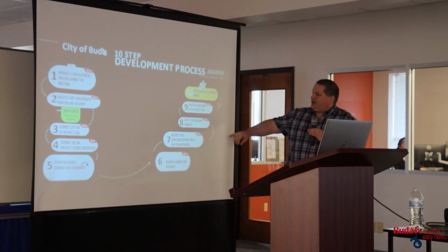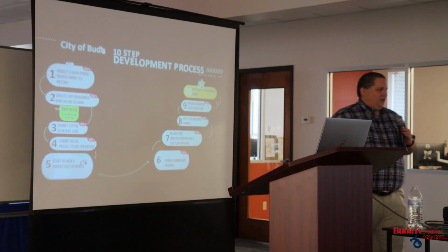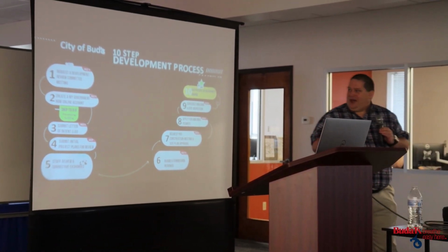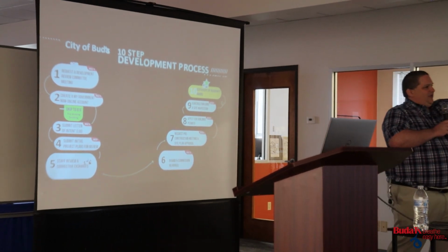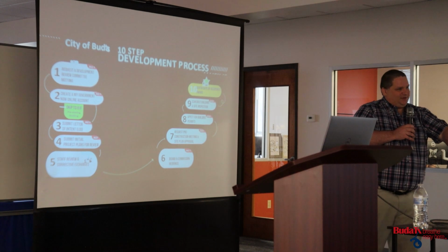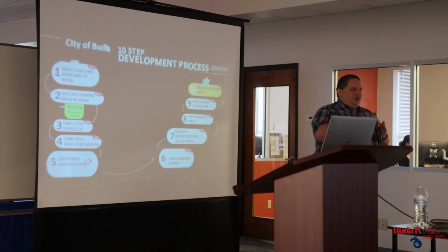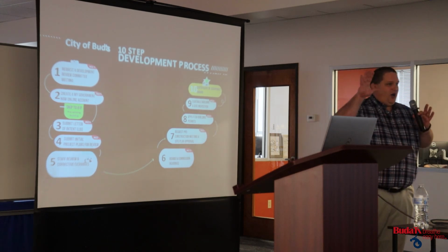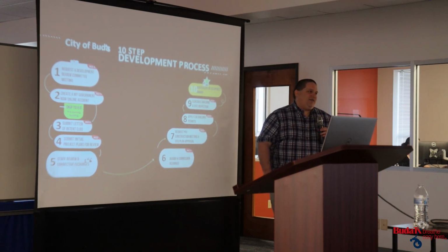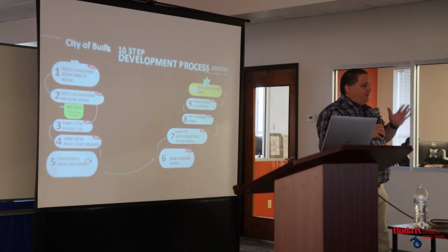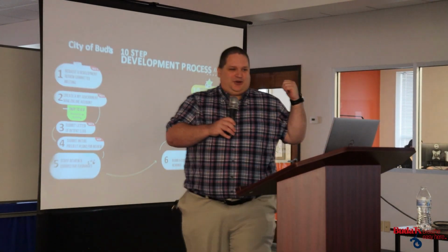Once you get your building permits, you start building your building, or you start installing your air conditioning, or you start putting in your signs. At that point, you can start scheduling inspections as things are built up. We do have a list like, we have these 5 inspections you have to complete before you can do these 5 inspections. Once you've passed all inspections on the site and on the building, you get that piece of paper that you're out here to get, that certificate of occupancy. The certificate of occupancy is what says, hey, we can open our business. And so that's the end goal.